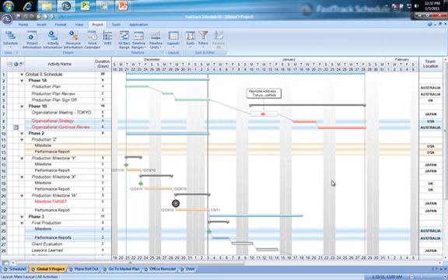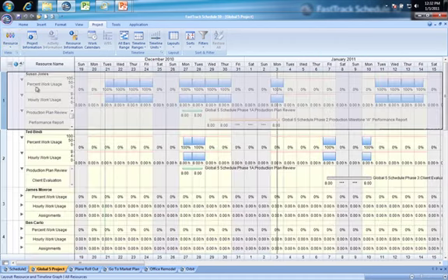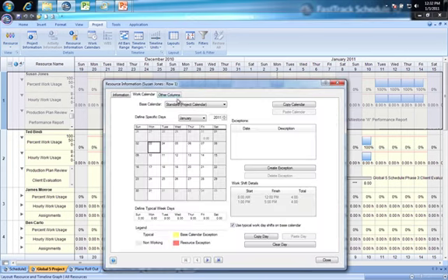And your work calendars aren't just being utilized with tasks. You can even use them with your resources. So if we go to our resource view and we open up one of our resources and see what calendar they're working off of, we can see that Miss Susan Jones has a standard project calendar. But I know she's based in Australia, so I just need to come here and change it to Australia holiday calendar. And the 26th is off as a base calendar. But Miss Jones will also take the 27th off because, well, it's party time.